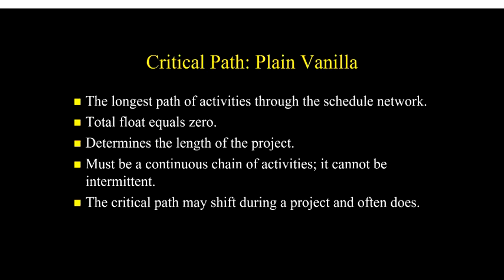Well, I think we have a great class with us because 95% of the people are correct, in the sense that just because a delay occurred doesn't necessarily mean that there will be a time extension. And the reason is that for a delay to extend the project completion time, that delay must have one important attribute. That delay must be critical. That delay must be in the critical path.